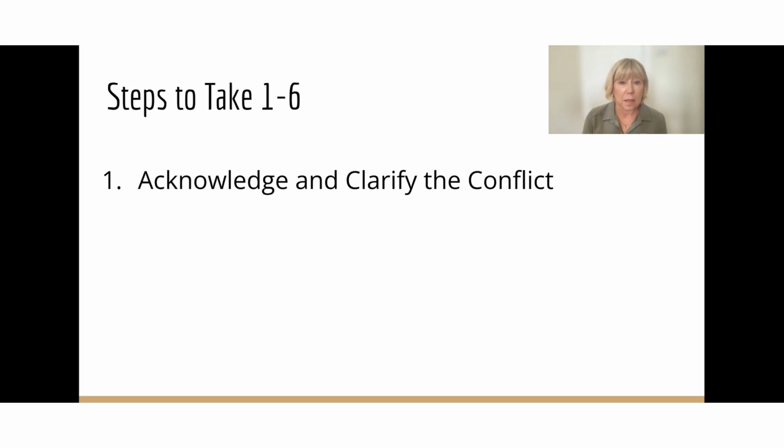The first step is simply to acknowledge and clarify the conflict, not trying to sweep it under the carpet. This can be done in different ways, but I would suggest to organize a meeting with the two parties to verify the two different standpoints and establish if they are conflicting and how. So, schedule a meeting with both stakeholder groups. Clearly restate each group's goals, like sales want to hit a market window, engineering needs more time for testing, and finally confirm you understand their positions. This builds trust.